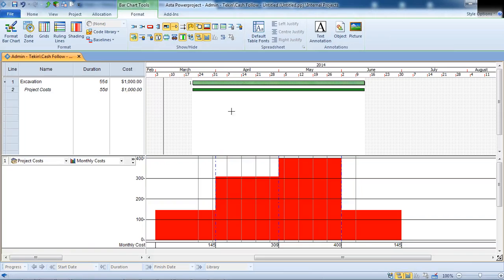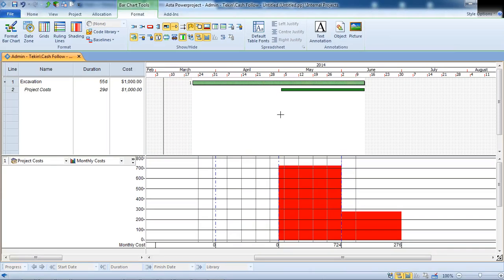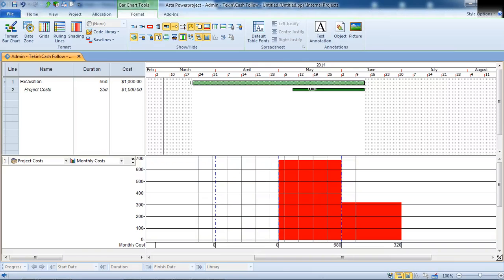And many people are complaining about the standard project management system. A standard system provides expenditures when the activity starts, expenditures when the activity finishes, or uniform across the activity. But many people say that yes, we start work in March for excavation, but our payment will start in May, so you can also plan financially and independently. Your work will start and in April end, and financially your project schedule starts. Even this can be outside of the activity.